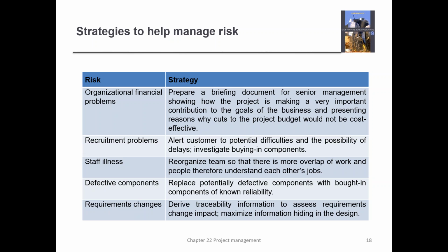Requirements. The product. Only the product. The project as well. The product and the project, because we know the product, because if you have multiple requirements changes, when you modify one section of the code, it might lead to other issues in other sections. So you might have some issues there with the product. Requirements changes may also extend the duration of the project. So those affect both. When these issues come up, somebody is going to have to pay for it.